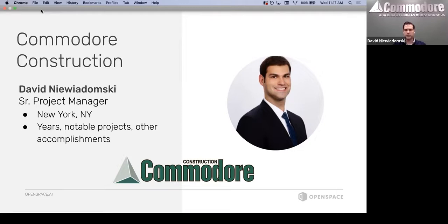And this is allowing me to utilize the 360 view. In meetings, I can bring it up, and I've done it basically every BIM coordination meeting, where we go through and show areas like, hey, we've had these walls framed for 2 weeks and there's no rough-in done. I'm able to do that without spending 2 hours on the road, because New York City is not exactly quick to get around, and push the GC to push the other trades to get their work done where it's available. Because we're able to see that, and sharing the screen helps, and a picture is worth 1,000 words. In this case, it's probably more like 1,000,000 words, because you've got multiple different things you can bring up.